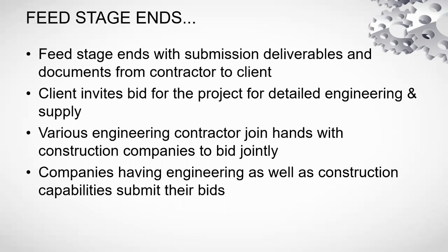So the bidding for these projects, if it involves supply and construction, are very tricky estimates and need to be done very carefully. So most of the time, clients don't wait for the FEED stage to end. They start sharing documents with engineering contractors in expectation of getting bids or cost estimates from them for the facility.